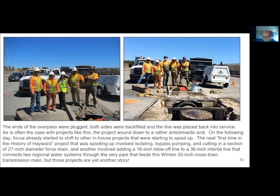So Robert Scott wanted to know, did you add the sled structures to the as-built drawings? Yes, yeah. So the as-built, oddly enough, basically the most important thing is what are the fittings, what are the dimensions, and where is all this stuff. So all that actually got sketched out on a piece of cardboard that we had laying around out there.